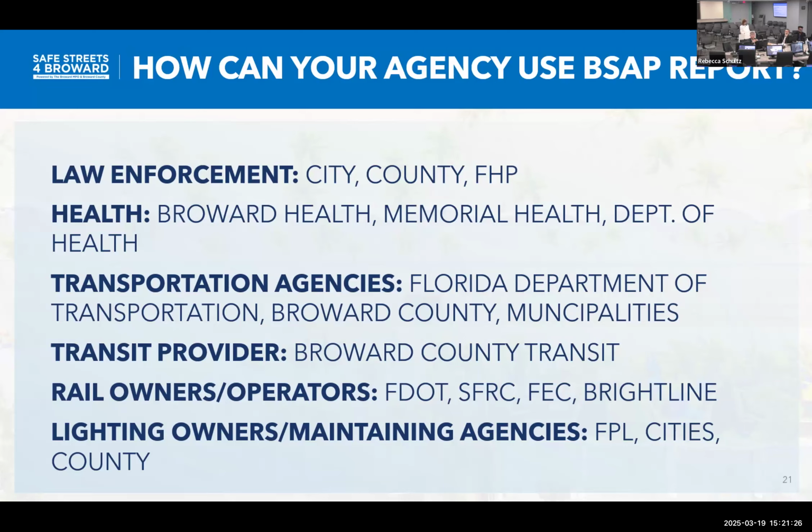Yeah. So there are 4 project specific ways that I'm aware of that some of these improvements could be made. Way 1 is the Broward MPO prioritizes a project and DOT funds it off your priority list. Way 2 is we look at the 5-year work program and we find projects that are already programmed and we see if we can incorporate some of these improvements. Way 3 is if we believe any of them would actually have, through safety funding, a BC ratio of this improvement, it could qualify for safety funding.